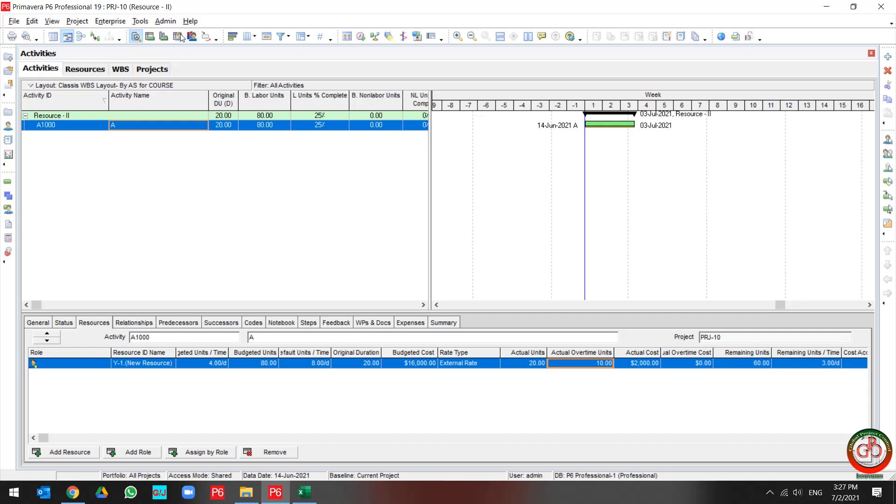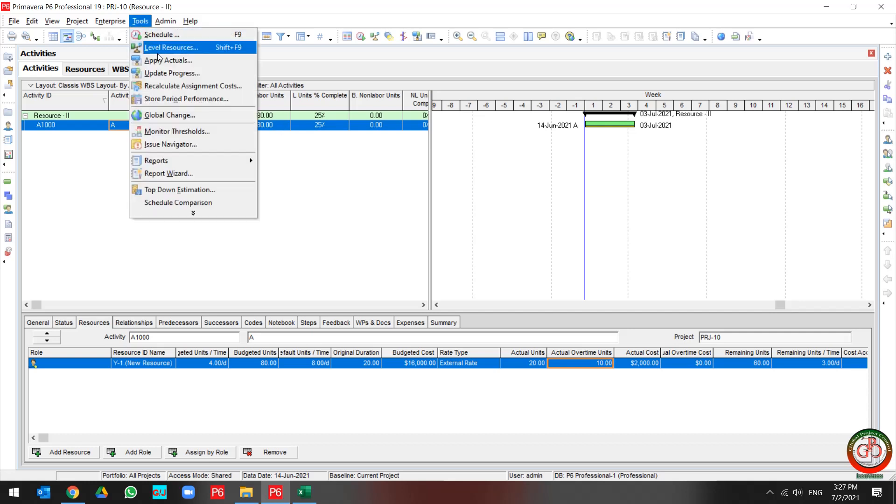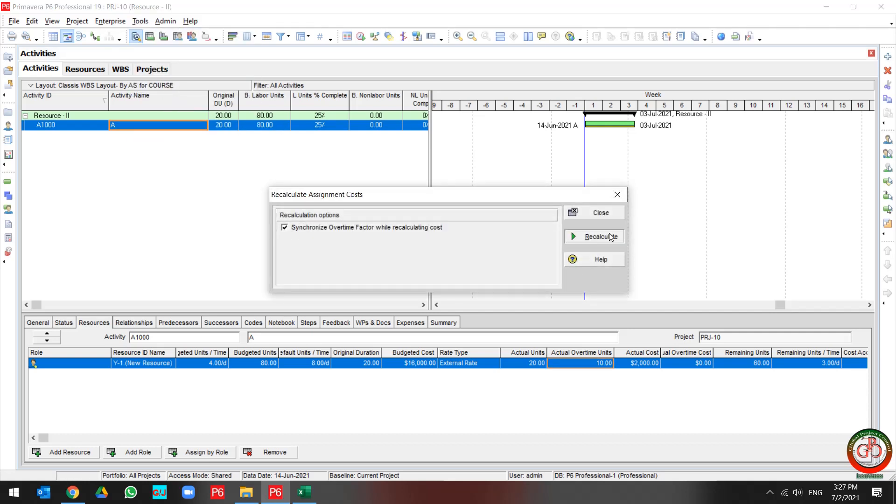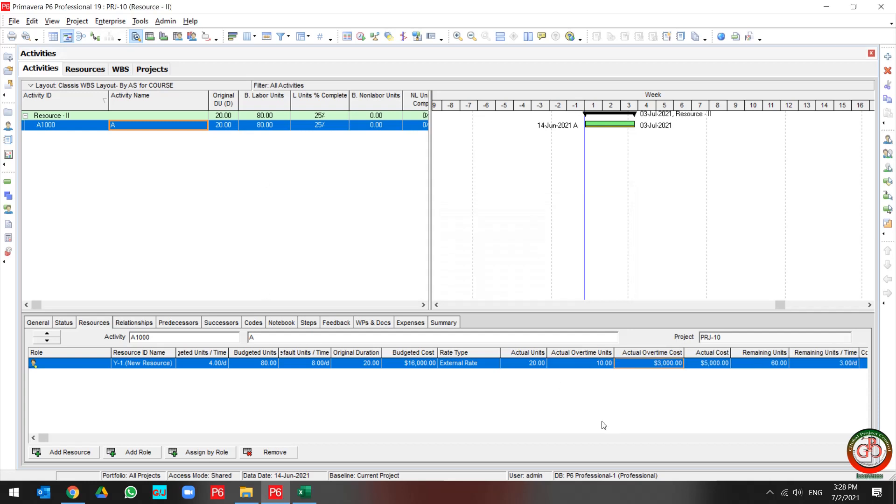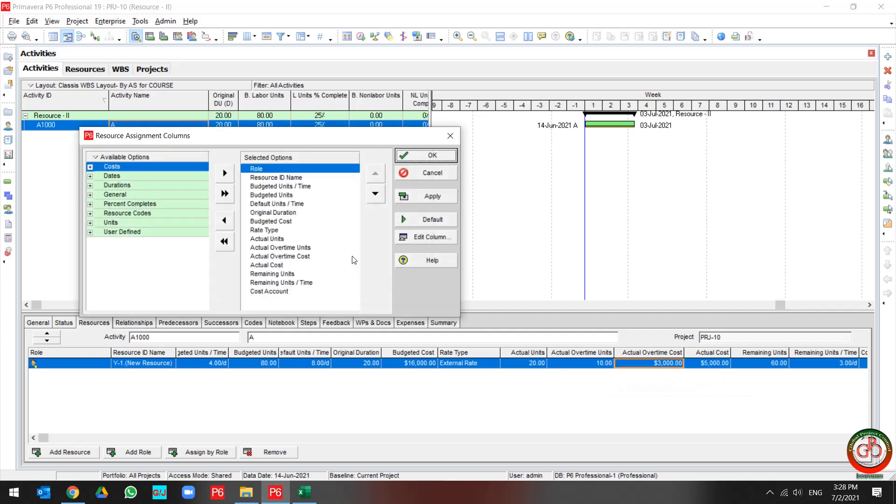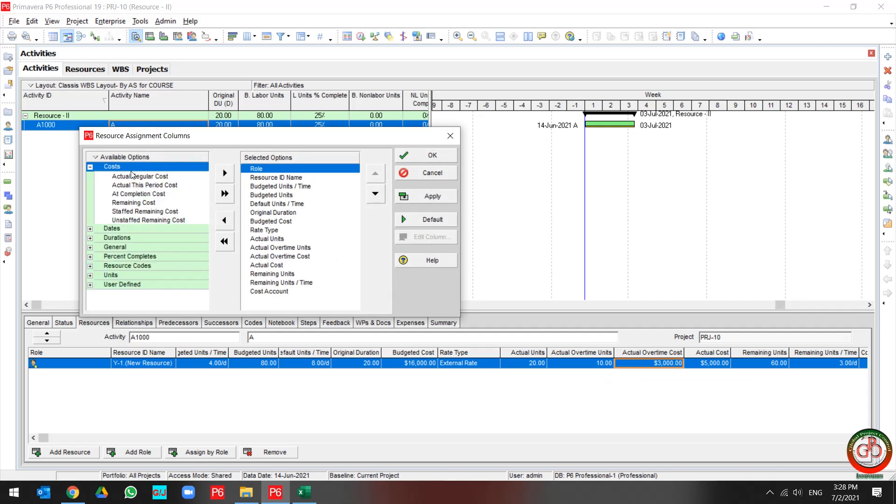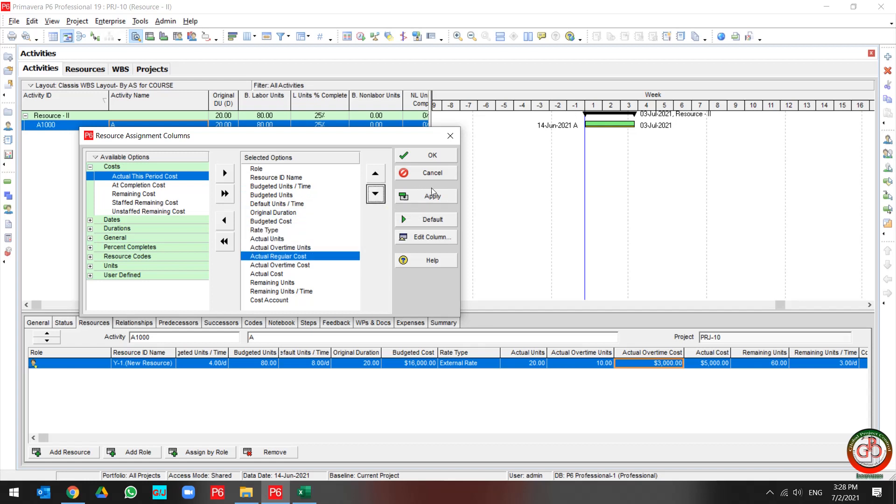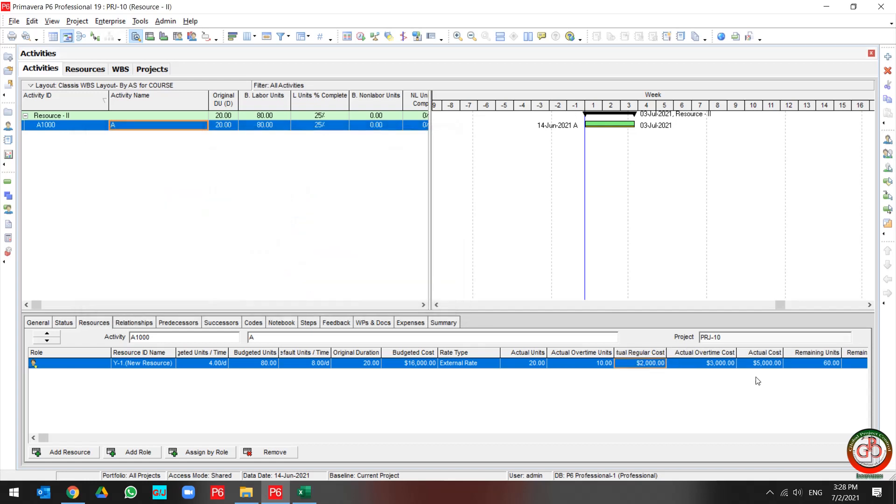Then I need to recalculate the cost. As you see, my actual overtime is changed to 3,000, my actual cost is 5,000. And if I go to find actual regular cost, it will be 2,000.